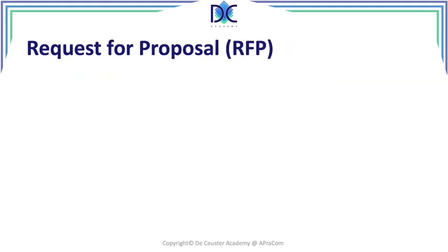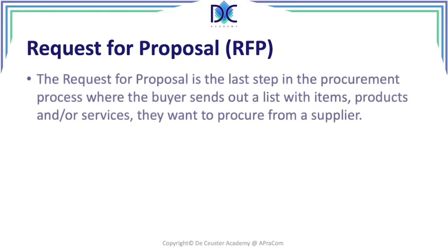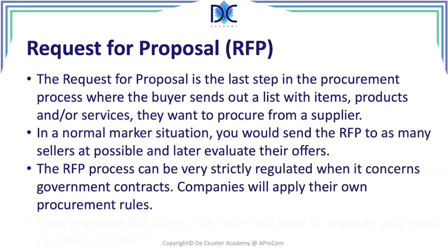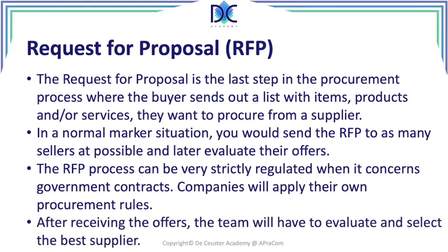Once you know this, once you have your idea, you can start what we call an RFP. An RFP is in fact a process where you're going to present a solution and give that solution to different suppliers. Those suppliers then will offer you a price, eventually offer alternatives, and you have to evaluate the proposals that you get. And from this moment on, you can continue with the negotiation process to finalize the contract.